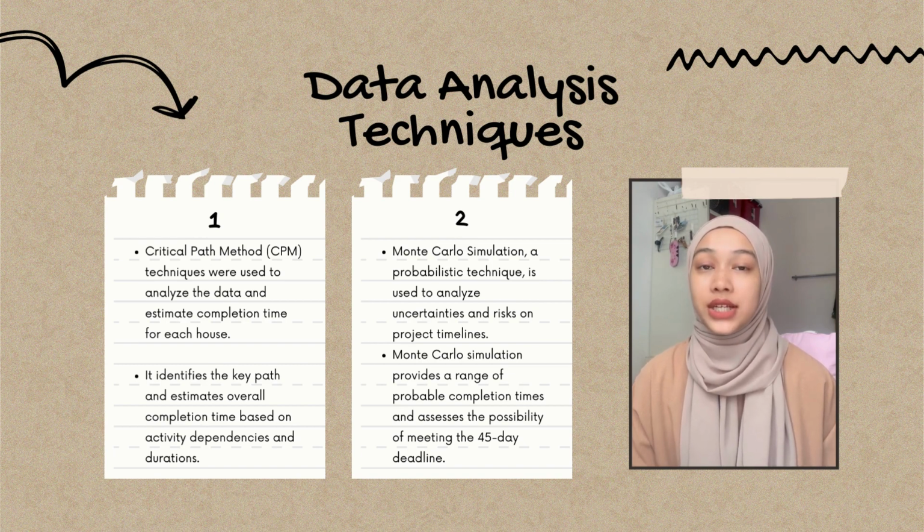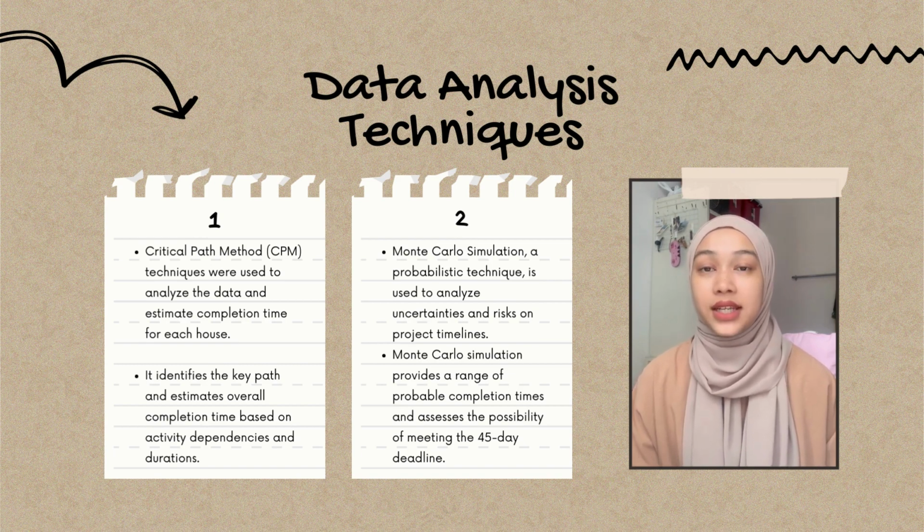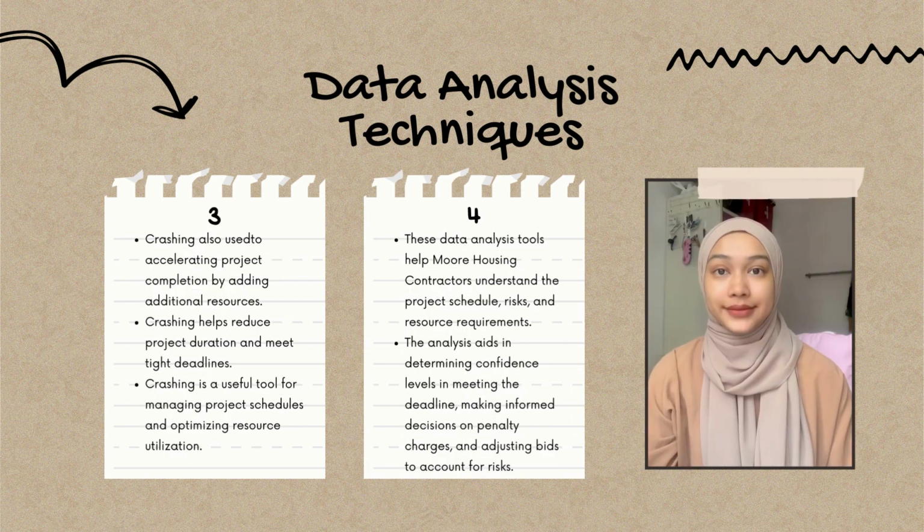Monte Carlo simulation, a probabilistic technique, is used to analyze uncertainties and risks on the project timeline. Monte Carlo simulation provides a range of probable completion times and assesses the possibility of meeting the 45-day deadline. It incorporates factors like bad weather and workforce fluctuation and performs multiple simulations.